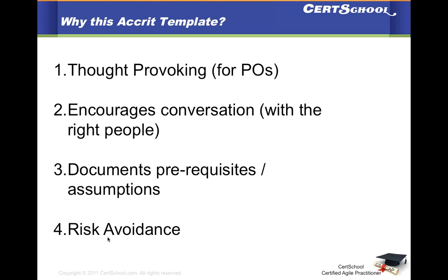If you are developers, working in teams, working as a scrum master or even project manager, whenever you see a user story and you don't see an acceptance criteria attached to it, that is a red flag for you. It has to be sent back to the analyst, or it has to be discussed.